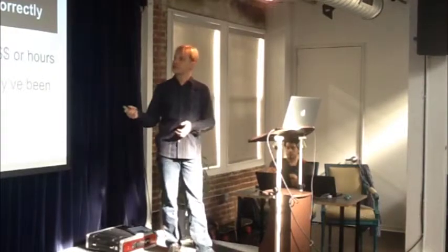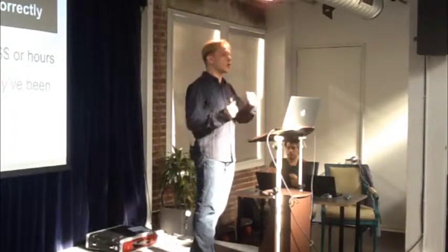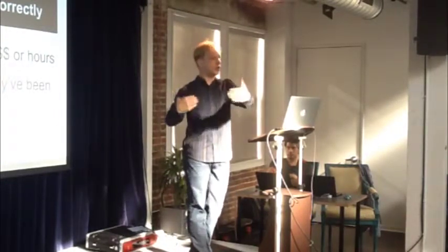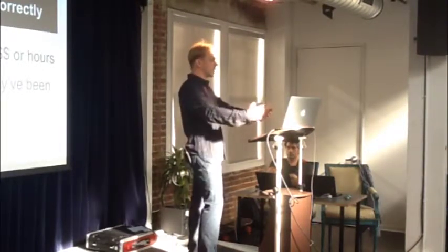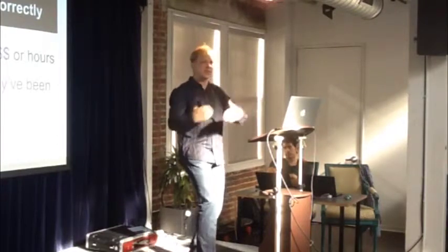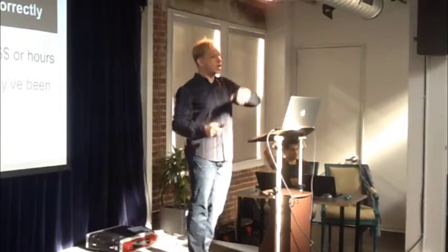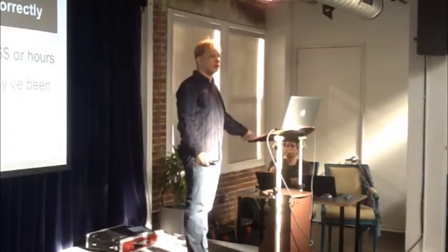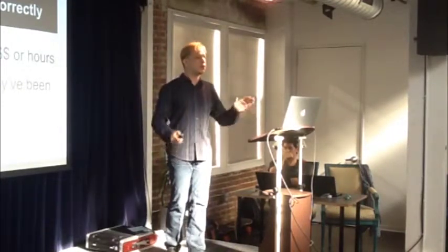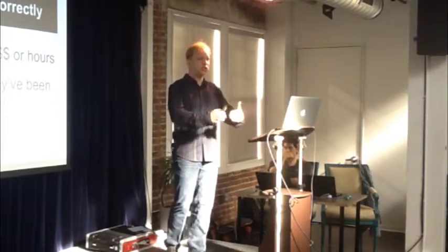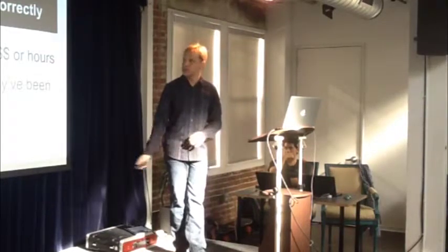The other important thing for your planning tool is never revise a task after an estimate has been made for it. A common fallacy is you write down, we've got this feature, it's going to cost this many points. We get into development, and when the client or the product manager looks at it, they say, you know what, it would be nicer if it did it this way. Or maybe we can add this change as well. As soon as you have made changes to the specification, you've completely invalidated the estimate, and you've wrecked the ability of the tool to help you predict your budget. It's very important that you make changes by making new tickets so that they can get independently estimated. Don't change the specification once an estimate has happened.